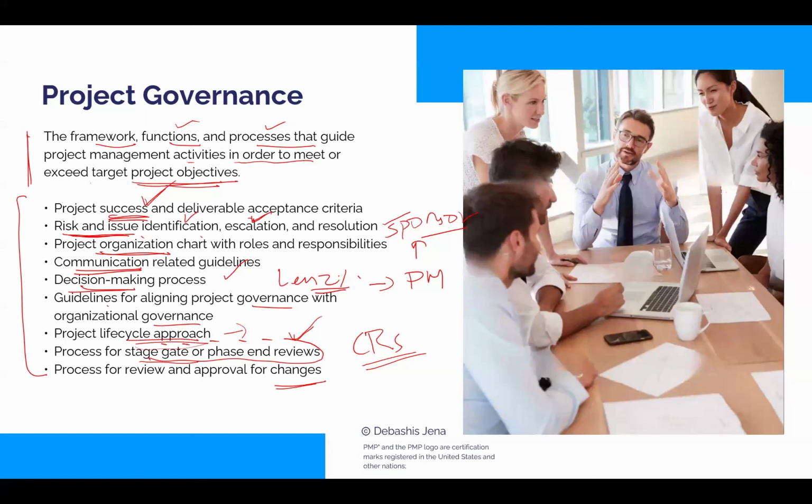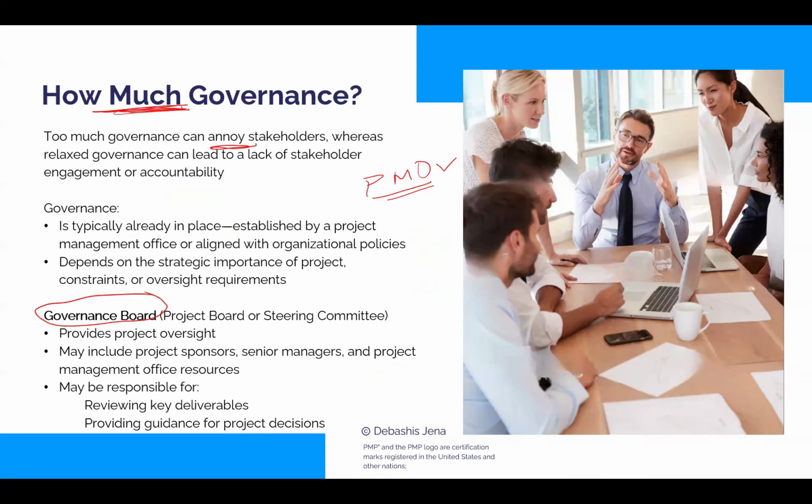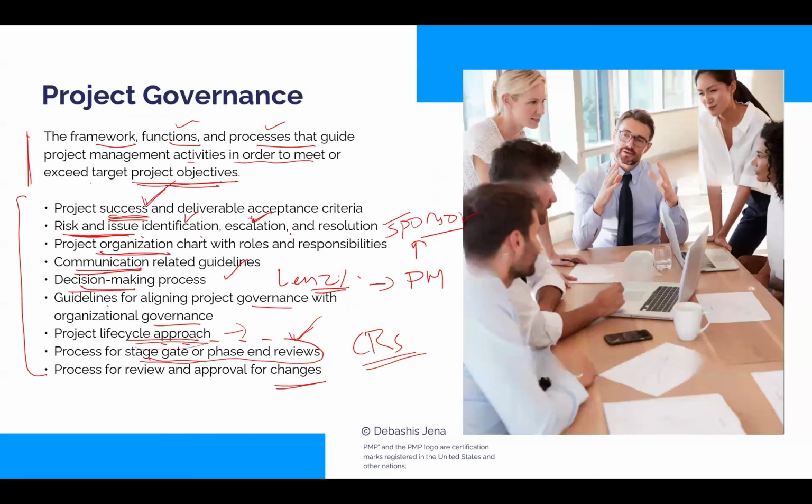Basically, governance is a separate thing, right? Like the project manager is responsible for the project governance, or is it a separate person who does the governance? Separate. If I were to do it, there'll be conflict of interest. So there'll be a governance board, a project board, a steering committee, whatever name you give it. The PM would typically be reporting to this board or committee, and this committee or board would be responsible for governance. Okay. That's right. Anybody else got a question?